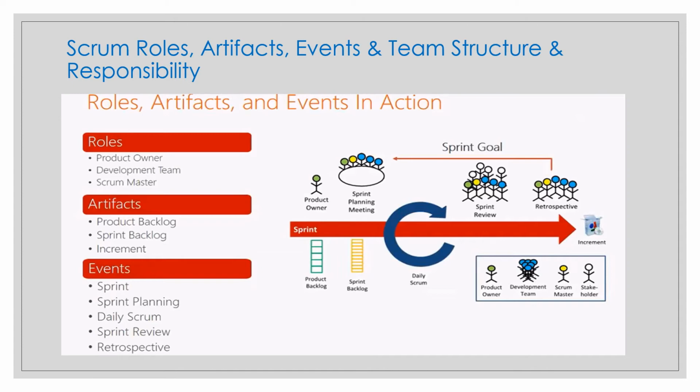The sprint retrospective concludes the sprint, and it is time boxed to a maximum of 3 hours for a 1 month sprint, and for a shorter sprint the event is usually shorter.